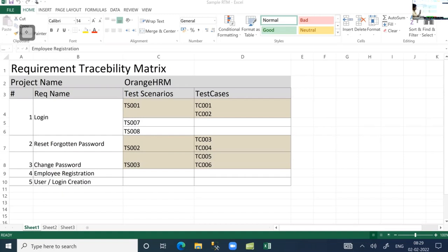Every day the team members write scenarios and test cases belonging to the requirements. Mostly in companies, work is allotted requirement-wise. Say today I plan that for the next 1 month we test the admin module of the product. There are about 10 requirements and 4 people working on this product testing. I ask one person to take care of 2 requirements, writing scenarios and test cases for the first 2 requirements. Another writes for the second 2 requirements. She studies only the requirement documents belonging to those requirements.